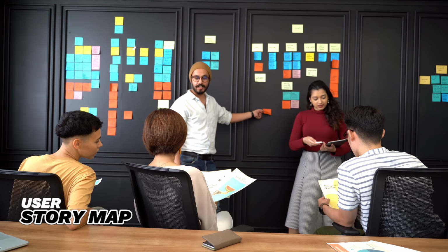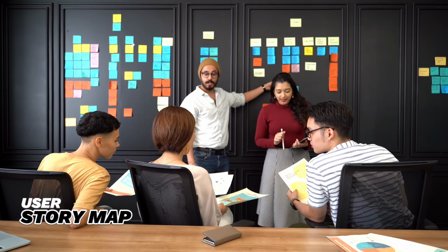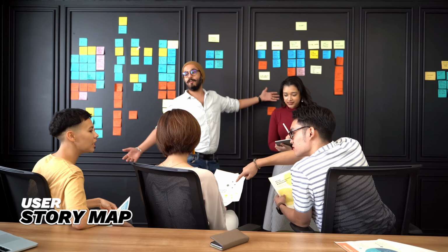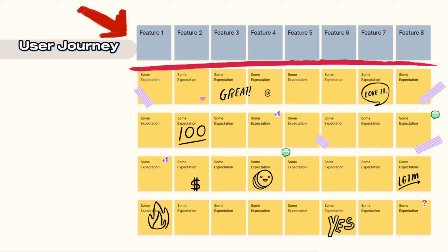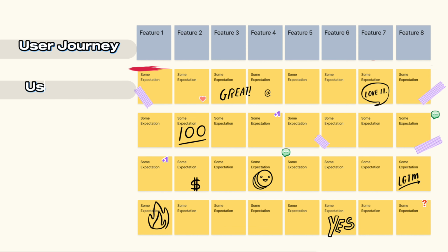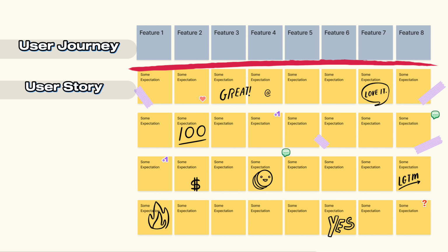In short, a User Story Map consists of several key elements that form a general vision of the product. The path that a player forms by fulfilling his needs in the game is often called a user journey, and it forms the spine of the map. In common practice, this is a horizontal line along which you put stickers with the desired user flow you are aiming to get. User stories give the user a possibility to achieve the completion of his journey.